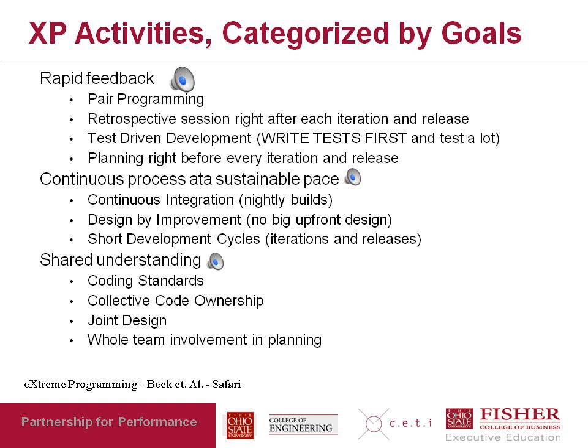The third activity is test-driven development. In fact, in XP, right after the requirements are written, the tests are written. The coding is not done until the tests are written, so that when the coding is done, the tests are available to test the code with. And also the tests serve to validate the requirements. The idea being that a requirement is not a valid requirement unless you can write a test for it. And the third activity regarding rapid feedback is that there is planning right before every iteration and release.